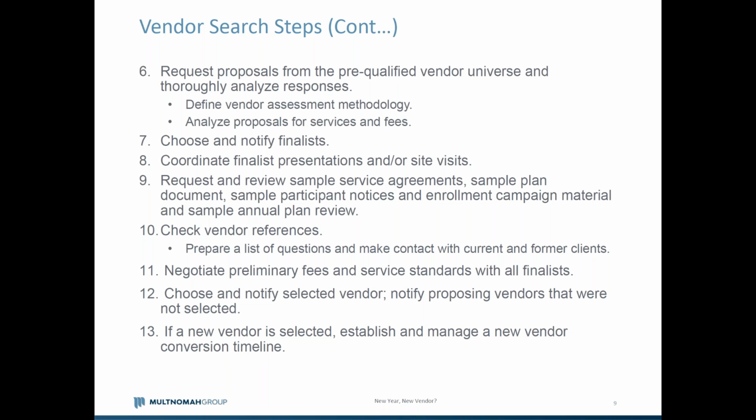We also frequently in that process include an ability in a structured way to ask follow-up questions that the vendors may have about the proposal and to distribute a response to those follow-up questions to all vendors. So as we do searches, there's an interim deadline to submit any questions that the vendors may have to us. We'll gather those and put together an FAQ document with the questions and the responses that we then distribute as a follow-up to all the vendors so that everybody has the same level playing field in terms of information about the plan.